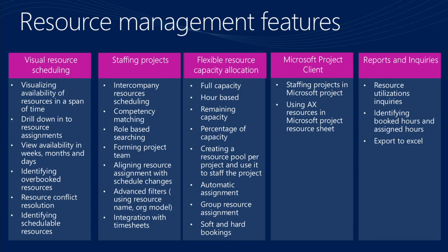So we have, and we still have, the concept of soft and hard booking, which is tentative booking versus firm booking. If you are firm booked or hard booked, as we call it, your calendar is marked. Other people will see that you are busy on this project. If you are soft booked, you are tentatively booked. Still other people see you, but they can grab you easily.